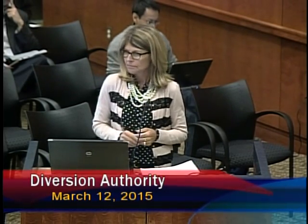Mr. Chairman? May I? Yes, Kevin. Terry, on that issue, in terms of the ability to come up with a mitigation plan, are there issues by not being able to do those cultural surveys that could have an impact on what type of mitigation would be done? We'll still have a plan for each site in the report. What it restricts is actually implementing the mitigation.